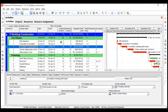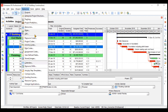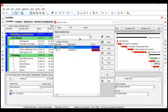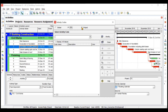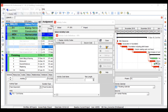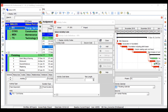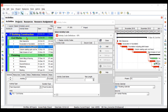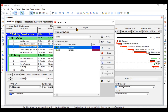So let's create the activity code. To create an activity code, you need to go to the Enterprise option in the toolbar, expand it, and click on Activity Codes. You can create activity codes for the EPS, and if you click Modify, you choose which EPS it applies to — that activity code will be valid only inside that particular EPS. If you choose Project, it's applicable only for that project. If you choose Global, it will be applicable to all projects inside Primavera P6.